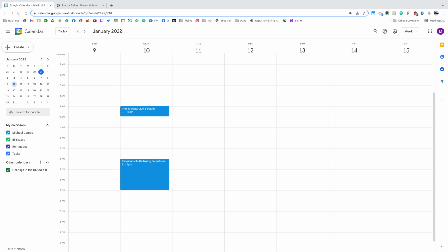And that obviously allows you to be more agile, but also it means that your team are spending a lot of time in sprint events because you're doing them more frequently. However, those sprint events might be shorter because you're doing them more frequently. There's lots of things to think about there, but we're going to stick with the 2 weekly sprint cycles. 2 weekly sprints is a popular choice.